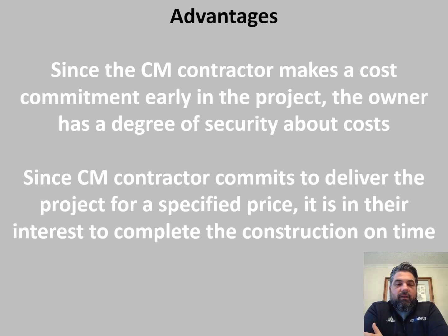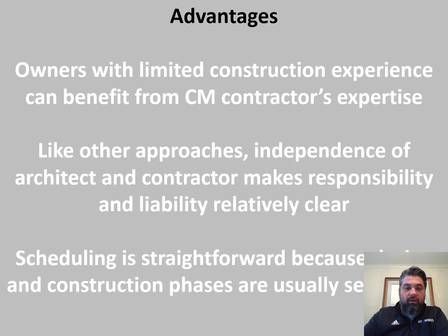Since the construction manager commits to deliver the project for a specified price, it's in their interest to complete the construction on time. So again, because they are also building it, they've got skin in the game. And so not only do they want to make sure that they hit a price that they think they can meet, but then also hit the time frame, to avoid increasing the cost of construction.